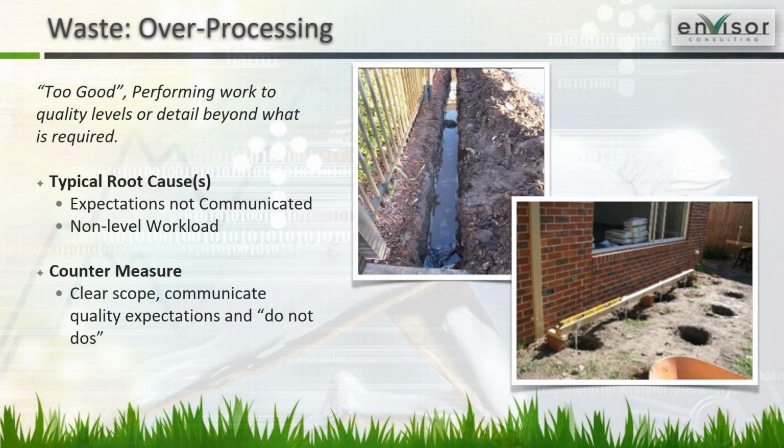This photo of this ditch, we were doing some irrigation installation, and the guys set aside the ditch witch because it was real muddy. You can see the water flow into the ditch, and it was up next to a fence, which they didn't want to risk the machine damaging. So they hand dug in the mud this trench, and it's perfect. You can put a laser down that trench. It's awesome, particularly considering the muddy conditions, but it's way over processing. All we're going to do is put in a piece of PVC pipe and cover it up. Over processing is doing the work too good.